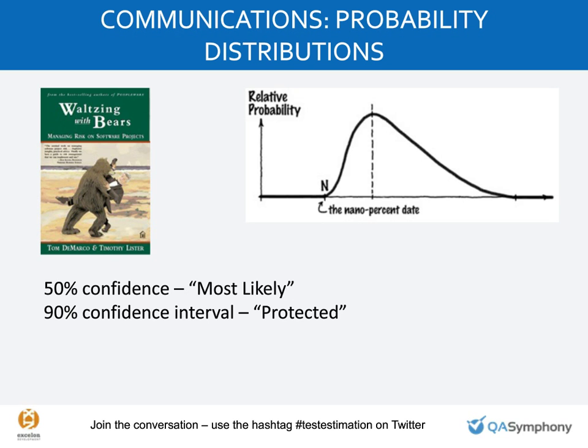We're pretty good at coming up with the nano% date. We need to stop doing that because we will look like a bunch of liars. And start talking in terms of based on past performance. Here's the 40%, 50%, 90% confidence interval. Even if we do that informally, based on our own experience, I submit that is better than a single number. And if you really want to hear about it, we could talk about how to do the math some other time.